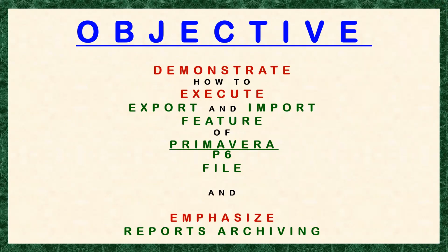Whenever in the future there is a need for file consistency, to support any arguments that may arise, the materials are immediately at hand, especially when there are claims on the extension of time. So this file is very important. This is really needed in that case.